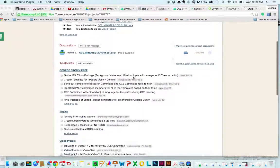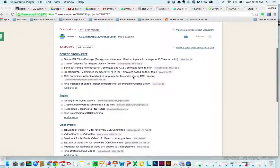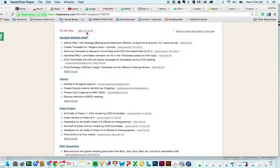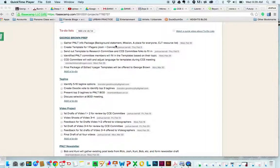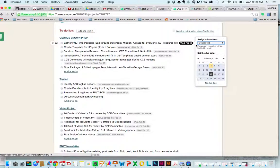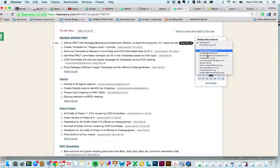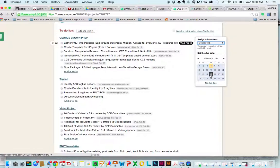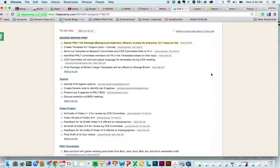So the to-dos are the most important. There's a series of to-do lists. A to-do list is a core thing like the George Brown preparation is an action item. There's a series of tasks under it. Each task can be offered a person who will do it. We can pick somebody as well as a date, and just by clicking, we select it.